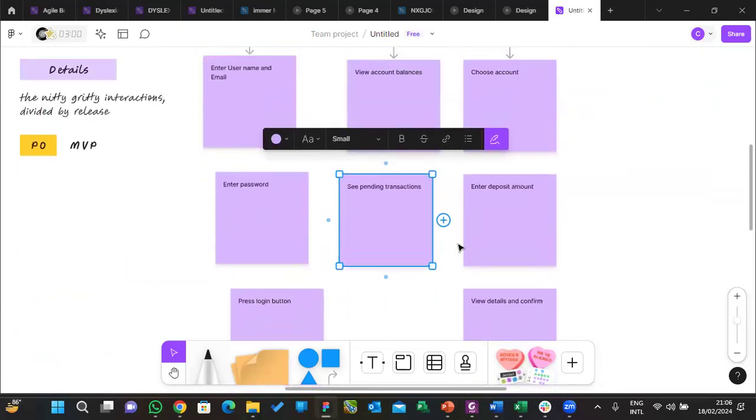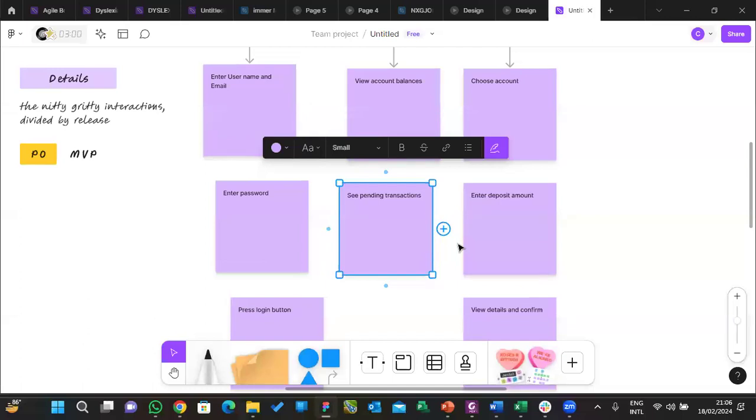So when you're done writing out the user stories from this card and all that, the next thing you're going to do here is to slice out your MVP, right? So what is MVP? MVP is actually the minimum features or functionalities that you're going to add to a product to satisfy the user of that product, right? So now this is where you're going to select all the possible user stories that you and your development team or the technical team who are there. Sometimes stakeholders can be in this meeting also, right? You select them, and once you've gotten all this, the next thing is to slice your MVP